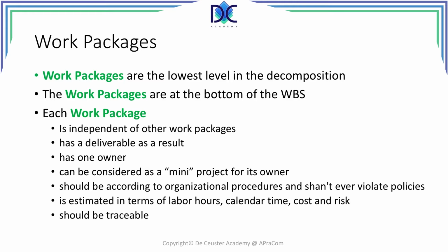How can we characterize work packages? First of all, work packages are independent of other work packages. Every work package has a deliverable. A work package can be assigned to one owner. For example, a work package can be the windows that have to be put in a building. That could be one work package.